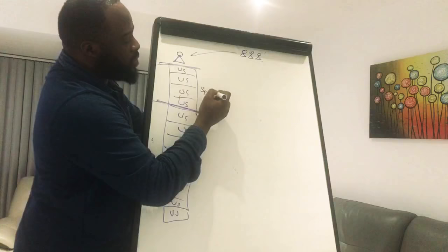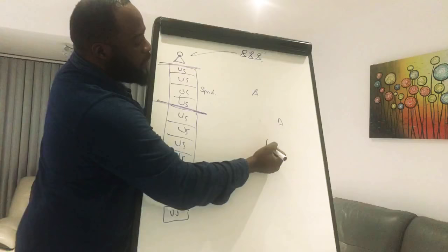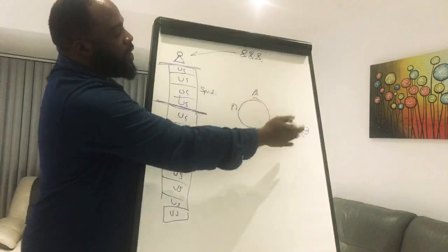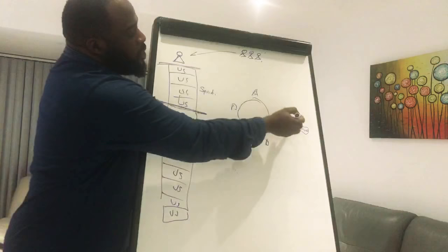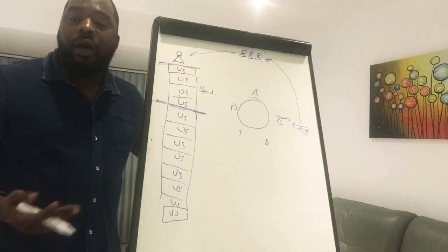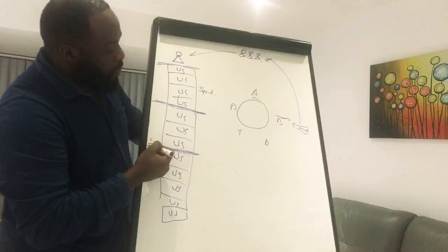So for this sprint, let us go through the process of analyzing, designing, developing, testing, deploying, and then we deliver a working minimum viable product. We deliver a minimum viable product that the customer can actually start using straight away, which is really good. So as the customer is using it, we are getting feedback from that customer, and we can come back over here and prioritize the backlog. Maybe there are certain features that are not working properly. Maybe certain features we thought were great, but now they're no longer great, and we can reprioritize the backlog. And then when we reprioritize the backlog, we now do a sprint review, okay?